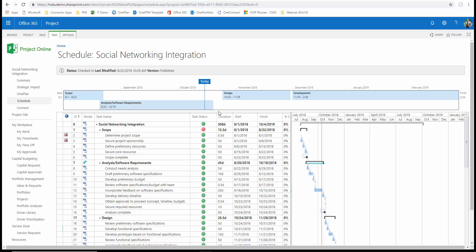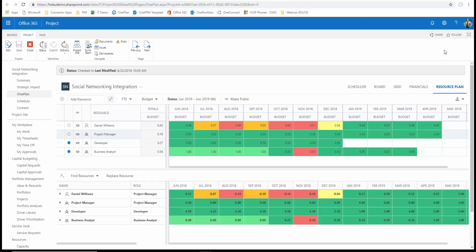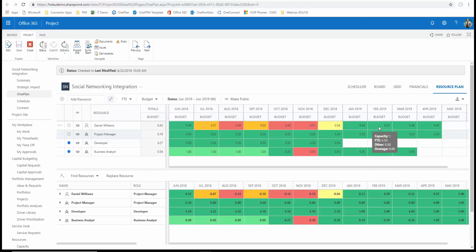Now, by adding OnePlan into the mix, a variety of features and tools are made available within Project Online right within the Project Online user experience. Here, within the Project Detail page, OnePlan is rendered and we can do things like resource capacity planning. Resource plans are a way to provide top-down resource capacity planning with the ease of using a spreadsheet. By entering values into the grid, we provide the ability to enter values by hours, FTEs, or percentages. We can see heat maps with overage or over allocations, and we can also choose a planning horizon and the increments that make the most sense, whether it be monthly, quarterly, annually, etc.